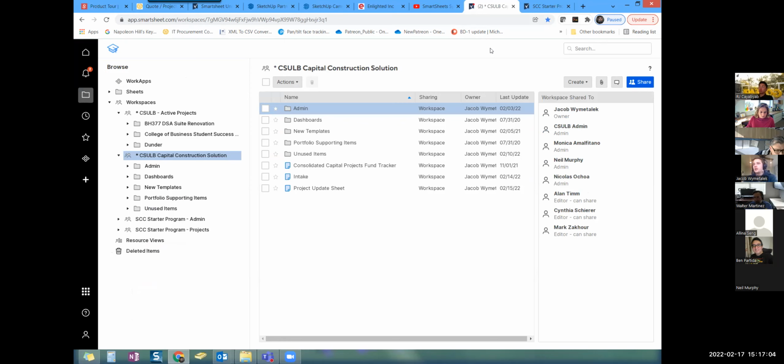So traditionally, if I create a new project without Control Center, I have to go into the report and add that sheet to the report. So the report now brings in some of that sheet's data. In this case, what we're telling it is that you don't have to do that. As soon as you create a project, I'll automatically add the relevant source sheet to that report. So it automatically brings that data in.